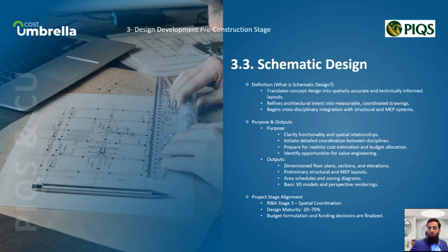Value engineering reviews often follow these stages to assess the concept. Preliminary cost estimates from schematic design are analyzed by value engineering to cut cost. For example, material substitution while maintaining design intent. SD also defines user spaces. Value engineering ensures efficiency, suggesting cost-effective alternatives for design elements like the facade.